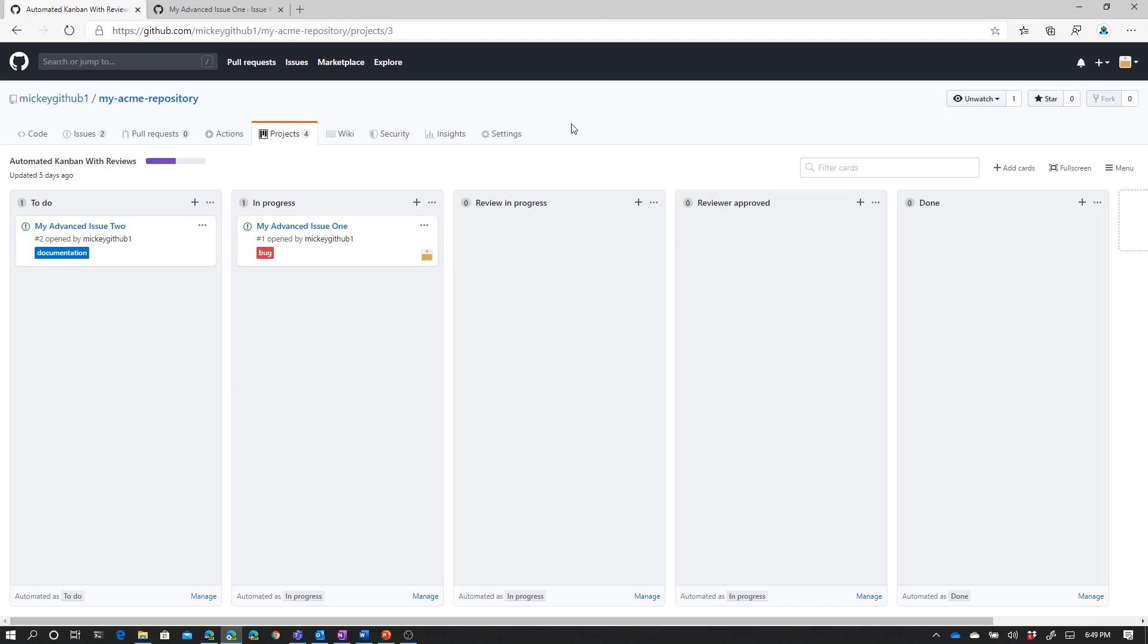So with the boards, we can either drag and drop our issues manually through our process, or we can use automation to help us with some of the movement of our cards as we work through our process and as our issues, in this case, change different states.